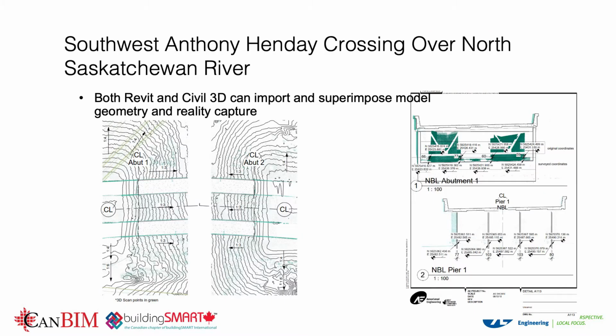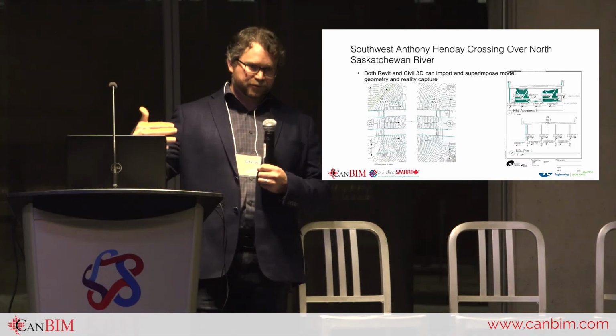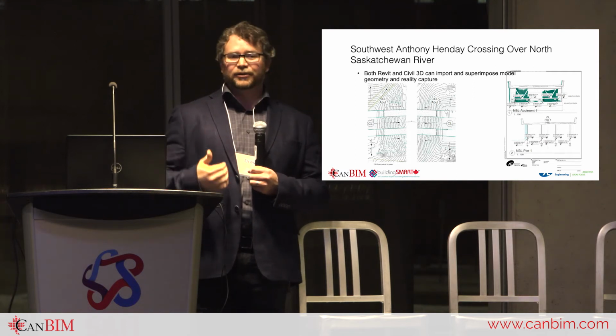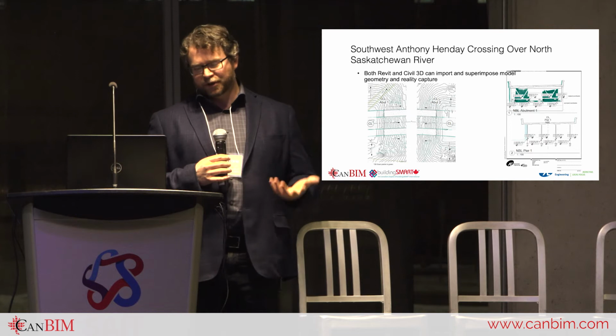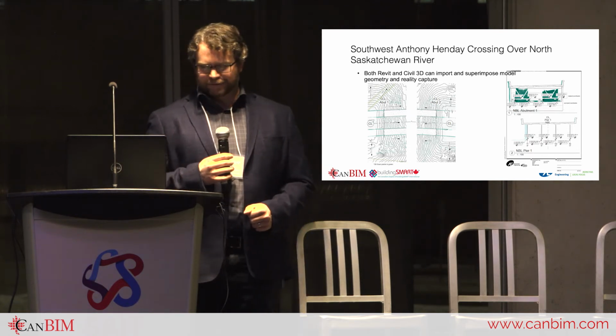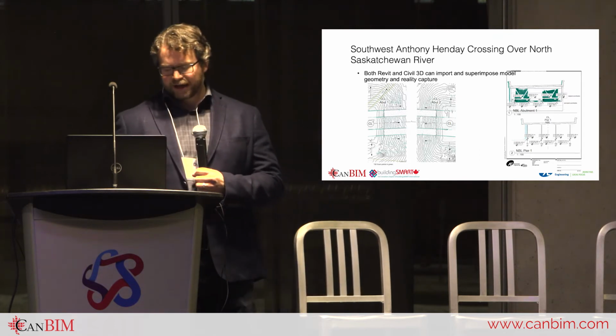In this case, this is again the Southwest Anthony Henday. We made a model based on the as-built drawings that we had. We had the 3D scan, and then we just superimposed them in the same coordinate system, and started to cut sections and measure where variances were. And this added a lot of value in making sure that as we're trying to tie into this existing bridge, we're tying into the right spots, and that what's out there is actually what we're expecting, so that we don't get RFIs that say the elevation wasn't what we thought, what do we do now? So there was a lot of value, and it didn't take a lot of effort on our part.